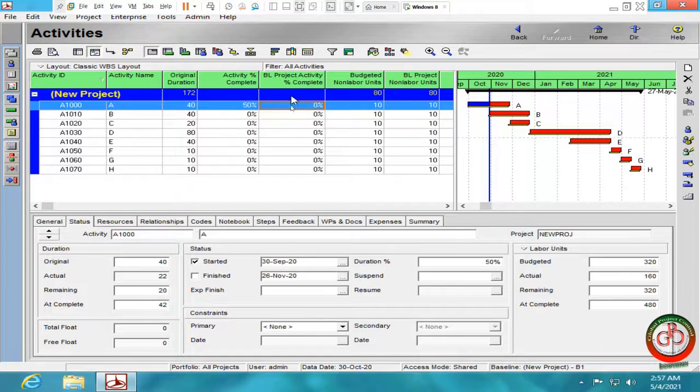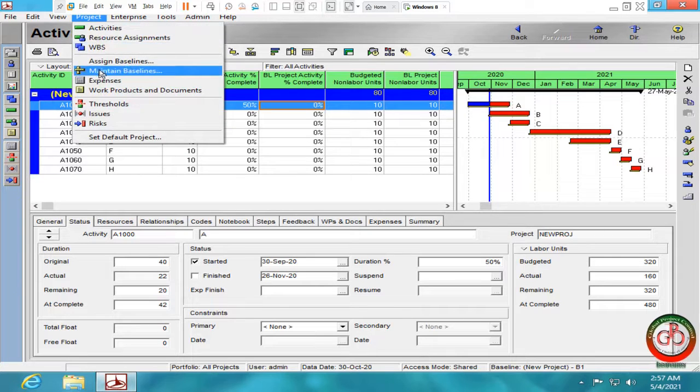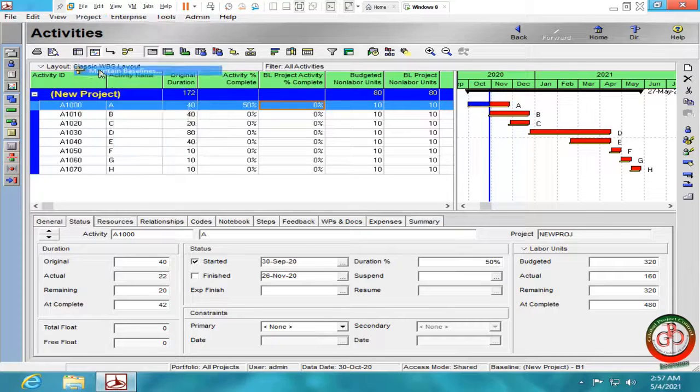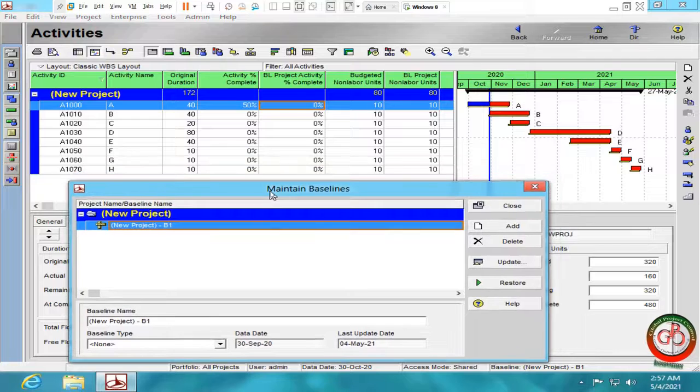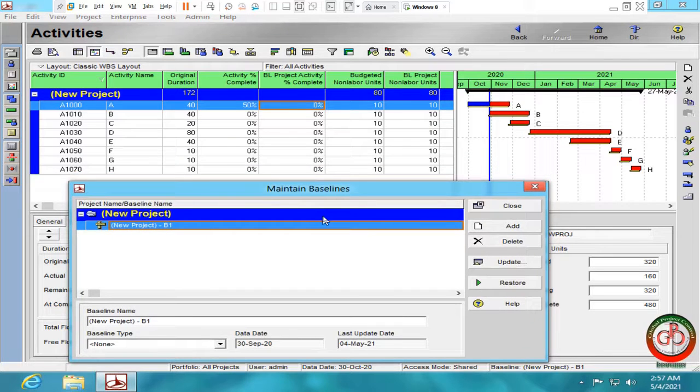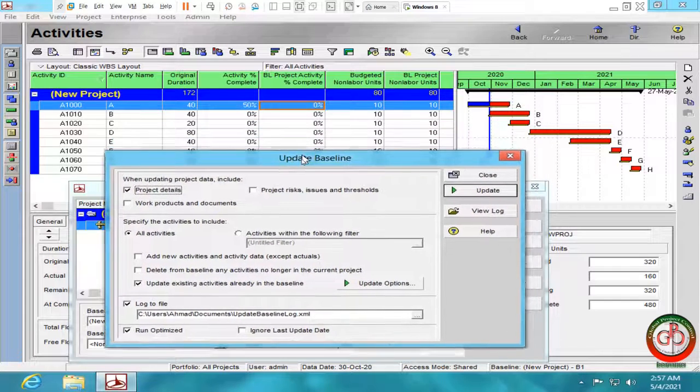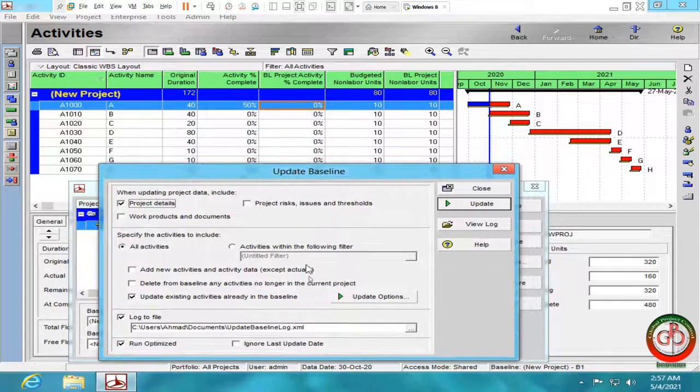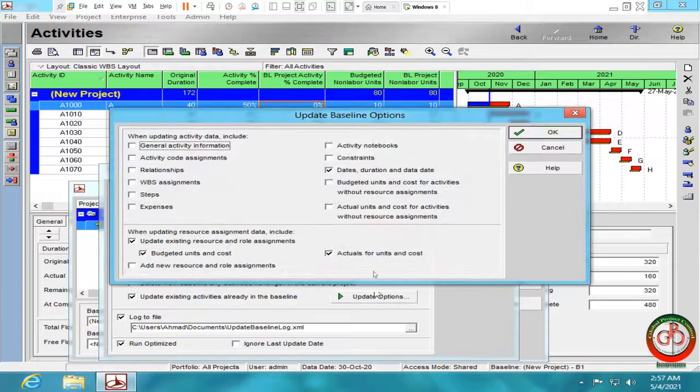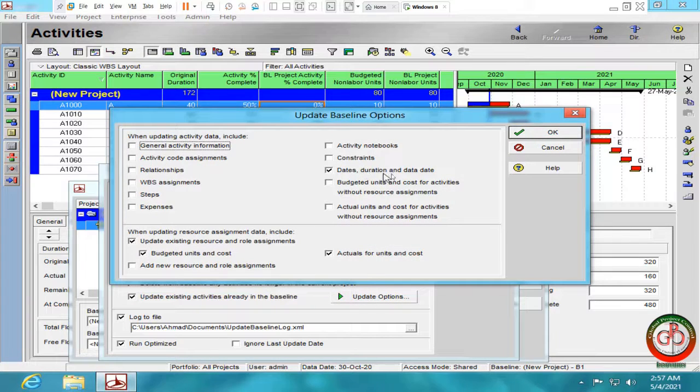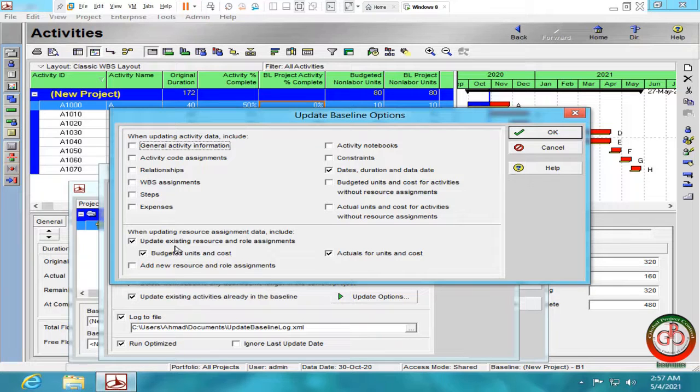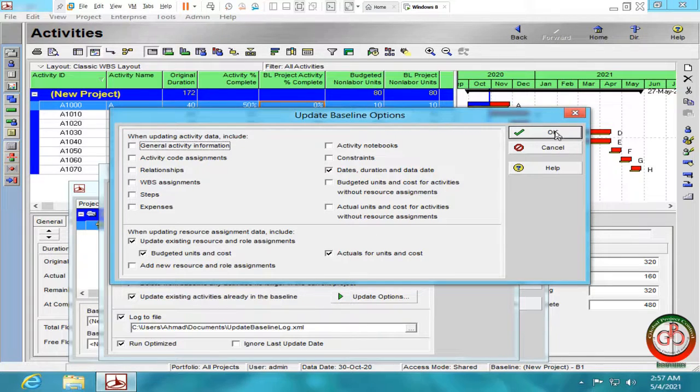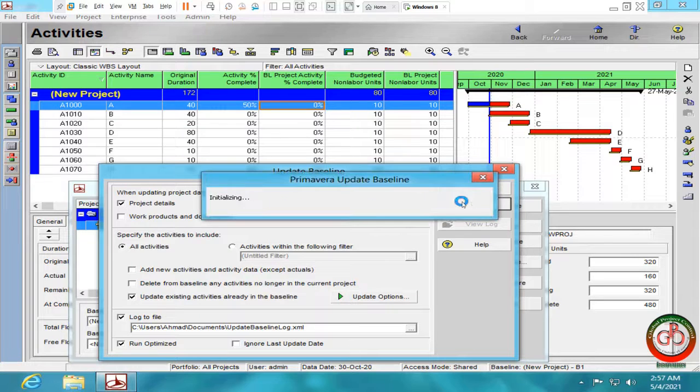But I need to change it to 50%. I go to the project, maintain baseline. You should assign your baseline before. Go to the update. Select update option. Date, duration, data date, actual unit and cost, budget unit and cost are selected. For update existing resource and role assignment. Then, do the update.